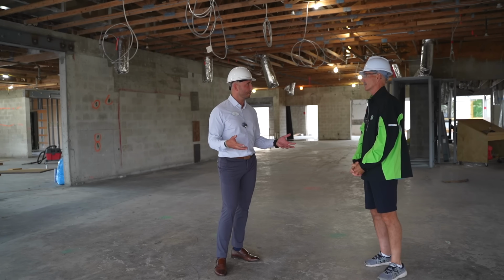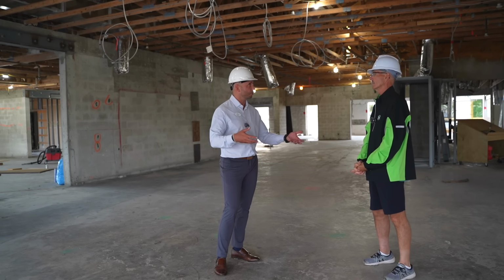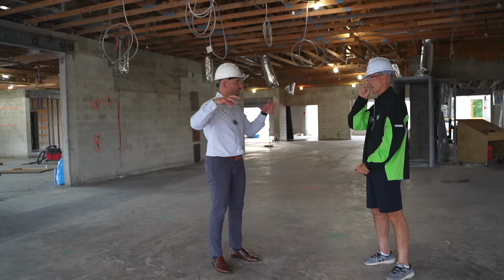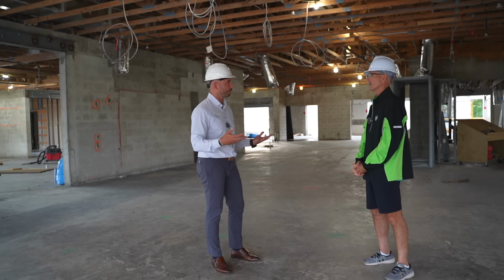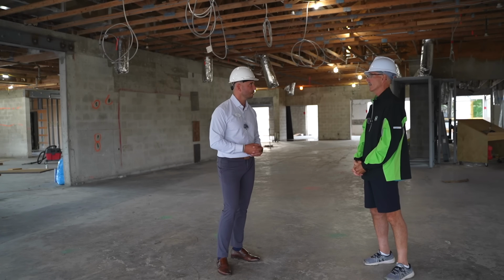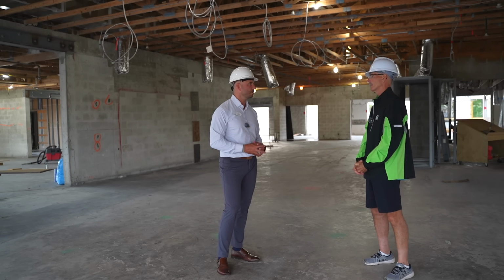So if everything goes to plan, the trusses show up on the 13th. We could start seeing both ends of the building start to take shape with the roofs the following week, the 16th, probably. Those trusses, probably 2 days to set them. Excellent. Because they have to bring in an expensive crane, and they want to get it all done once. It's another great milestone. Absolutely.